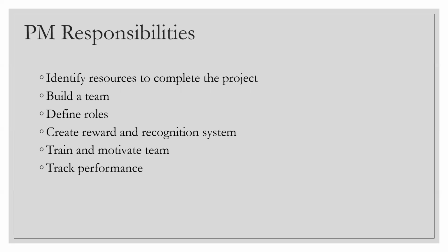If we break down that hire and develop leadership principle into multiple activities, you are going to get a crux. The first point is the PM has to identify the number of resources they need to complete the project. And how do they get that? Very simple. We have seen how the scope is there, the work breakdown structure, and how we break down that entire scope into a network diagram.